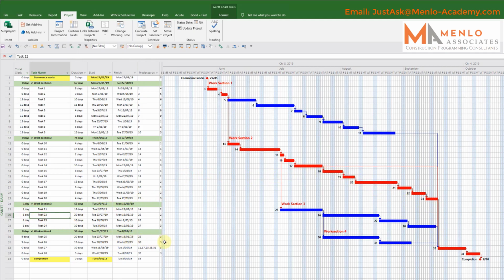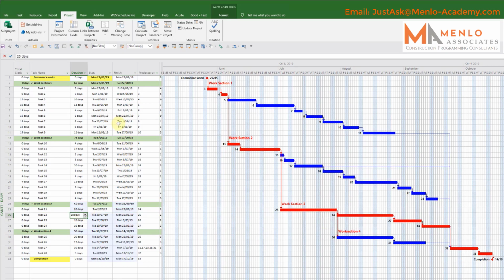Likewise, if we look at this one down here, this chain of work has 1 day of slack, and this chain of work has got 9 days of slack. So this chain of work is obviously quite important in relation to the critical path, because if, say, this job takes 20 days to complete, immediately the critical path will jump onto that.